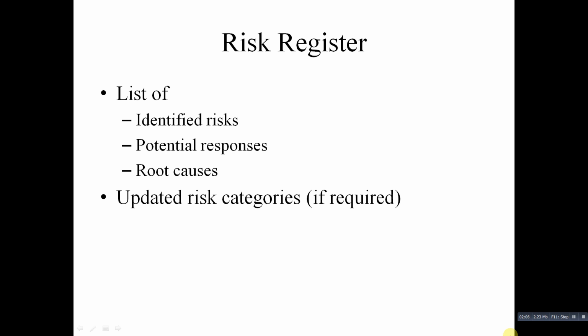Then the next constraint is the name of the risk event. Example names include defective server, late completion of testing, reduced consulting cost, and good publicity. Then the next thing is a description of the risk event. Because the name of a risk event is often abbreviated, it helps to provide a more detailed description. So the description of the risk event must be there in the risk register.